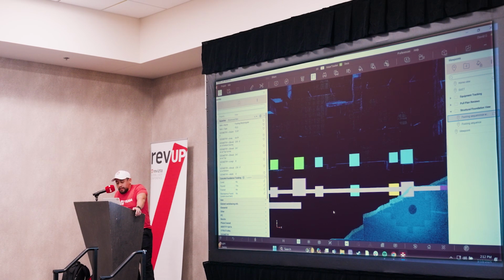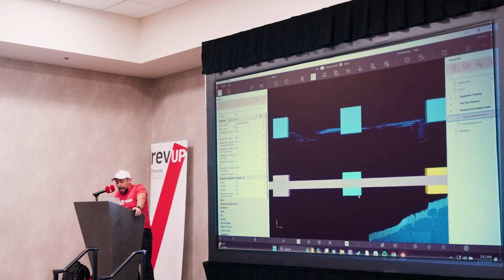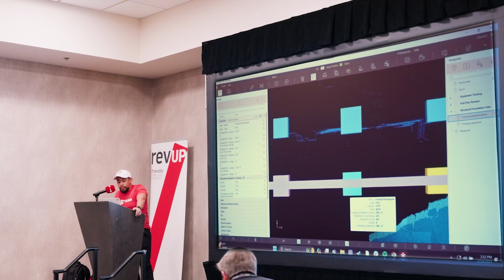I have poured, cured, and the idea for the workflow is to find discrepancies, to understand where our problem areas are. So in cases where I need to apply a discrepancy to this footing, let's just say the footing was poured, it was up to be cured, but we then begin finding a honeycomb effect on one of the footings that needs to be repaired.